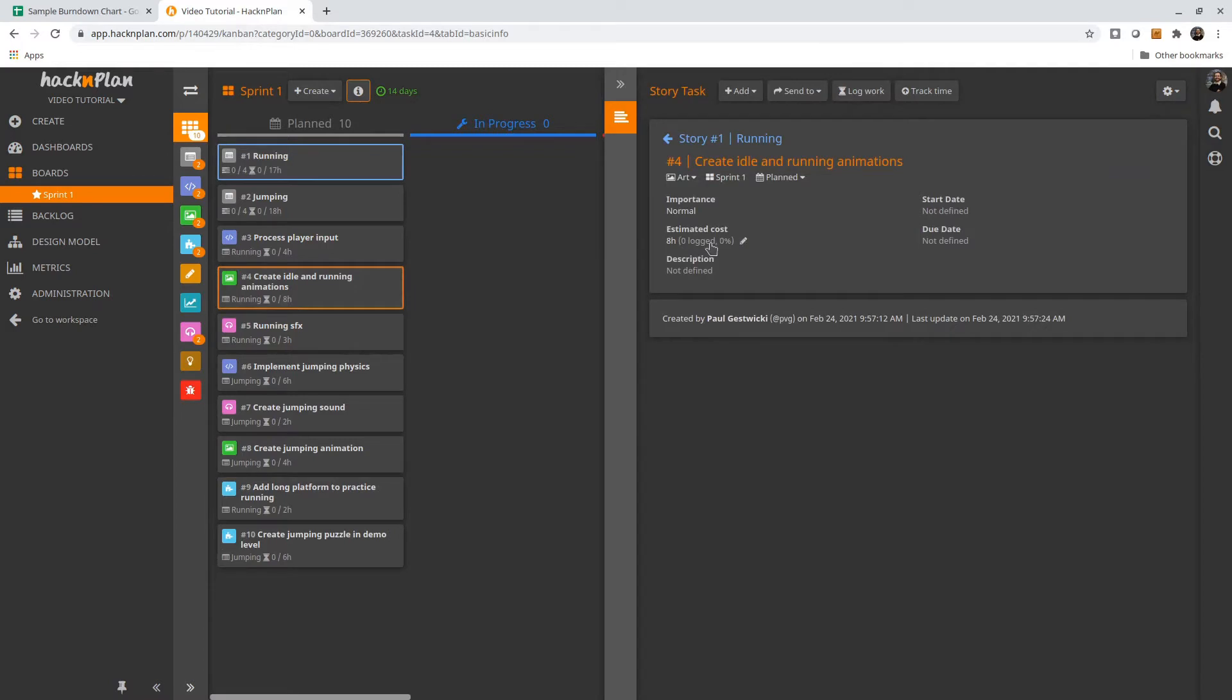Each task has an hourly estimate. There's an important part of this I want to mention. It's a technique that I use when I'm managing my student teams. We never track how much time we spent on a task. I read some advice years ago that was really useful to me. It pointed out that if you track how much time you spent on a task, that can be a bit demoralizing and doesn't necessarily help you succeed.